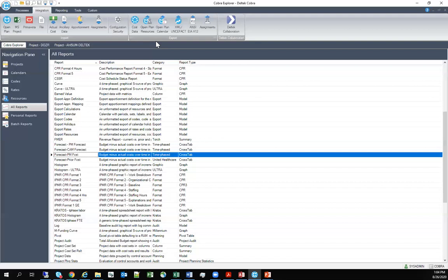And I do want to show a few of the exports here. I think I'll run this cost data export, but we have a few others available. A lot of these come down to, if you have an earned value requirement, the old IPMR requirement required you to submit an XML file in this UN/CEFACT format directly to the government. They had a site, you'd upload that on a monthly basis, and would usually provide a visual report as well, usually in Excel or PDF or something like that.